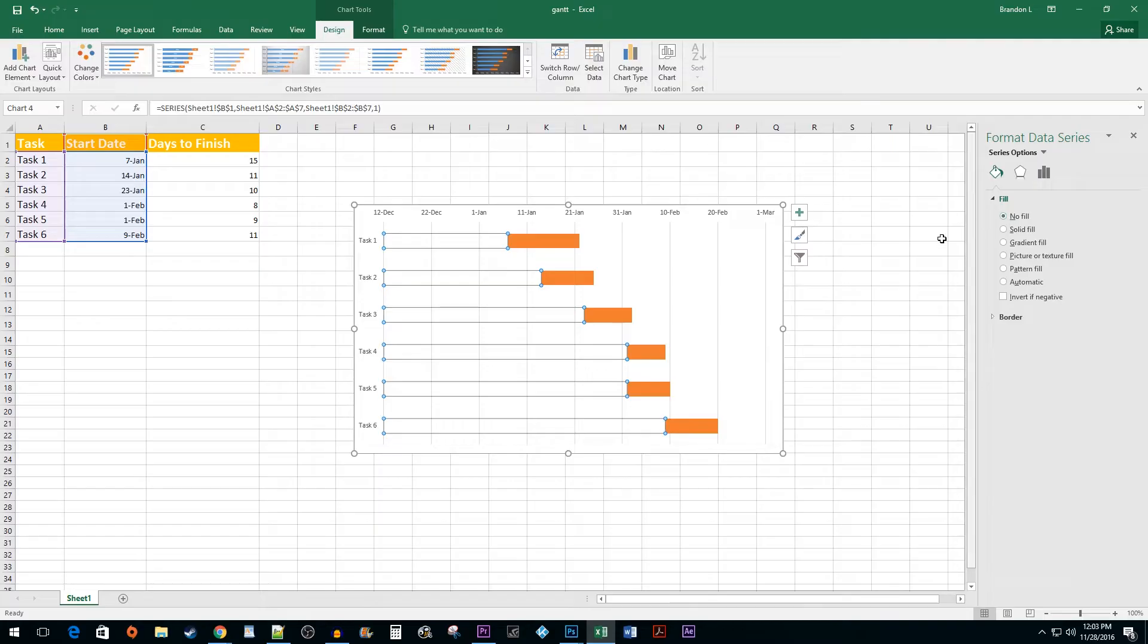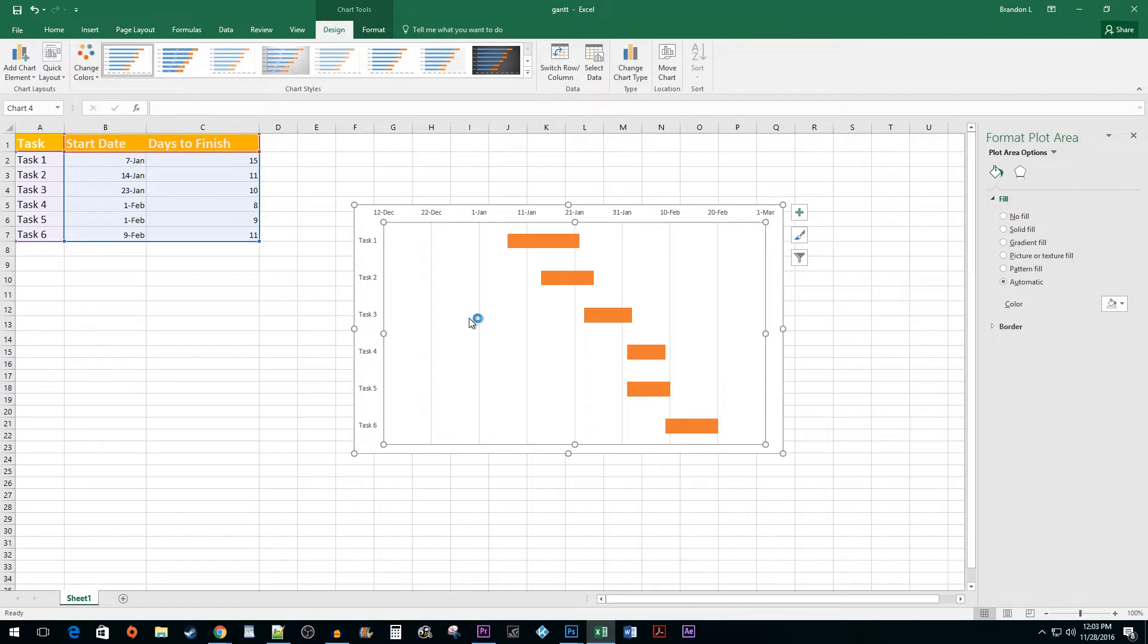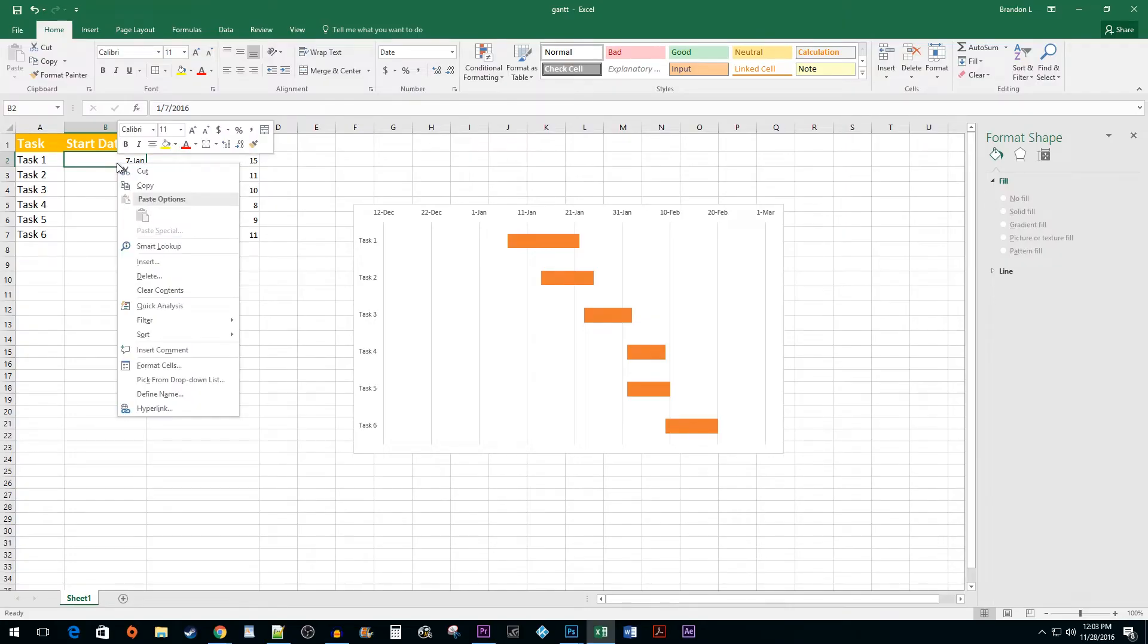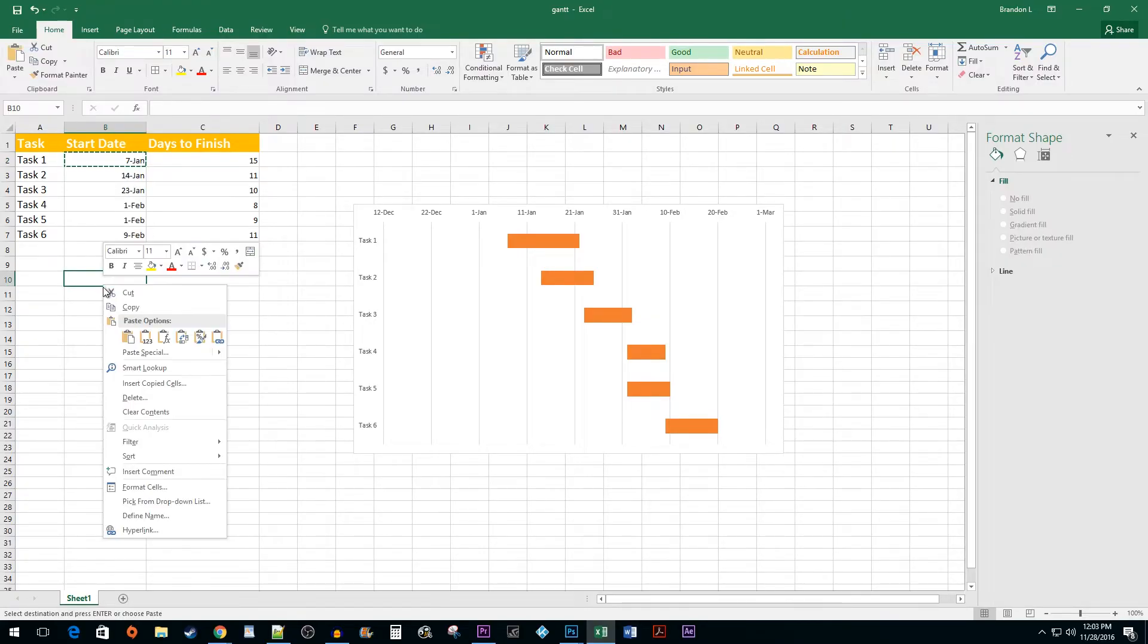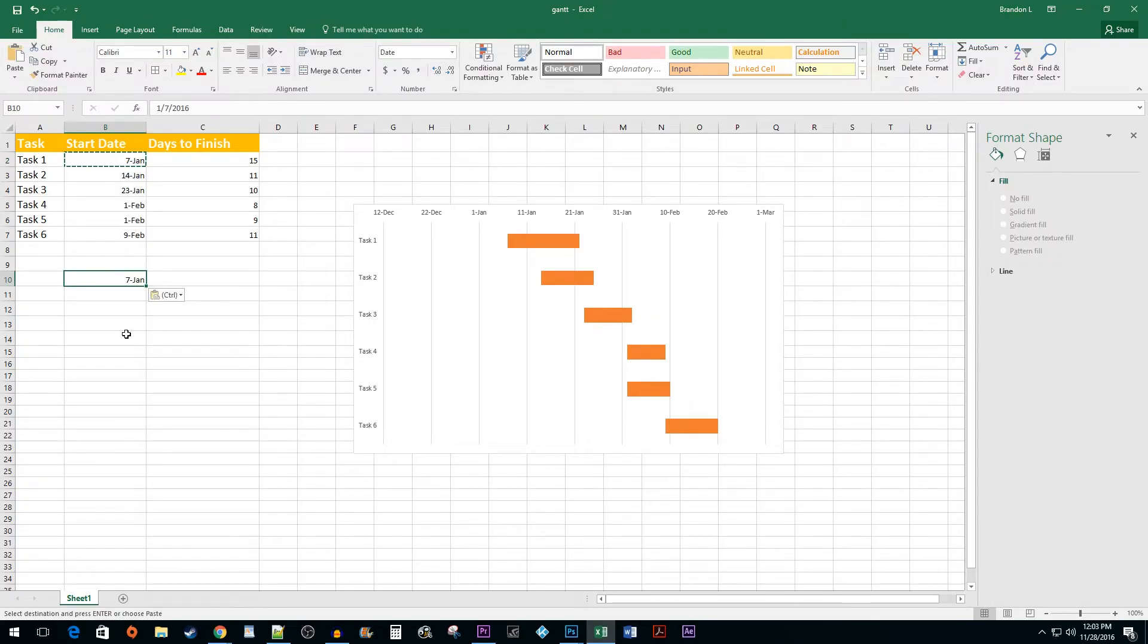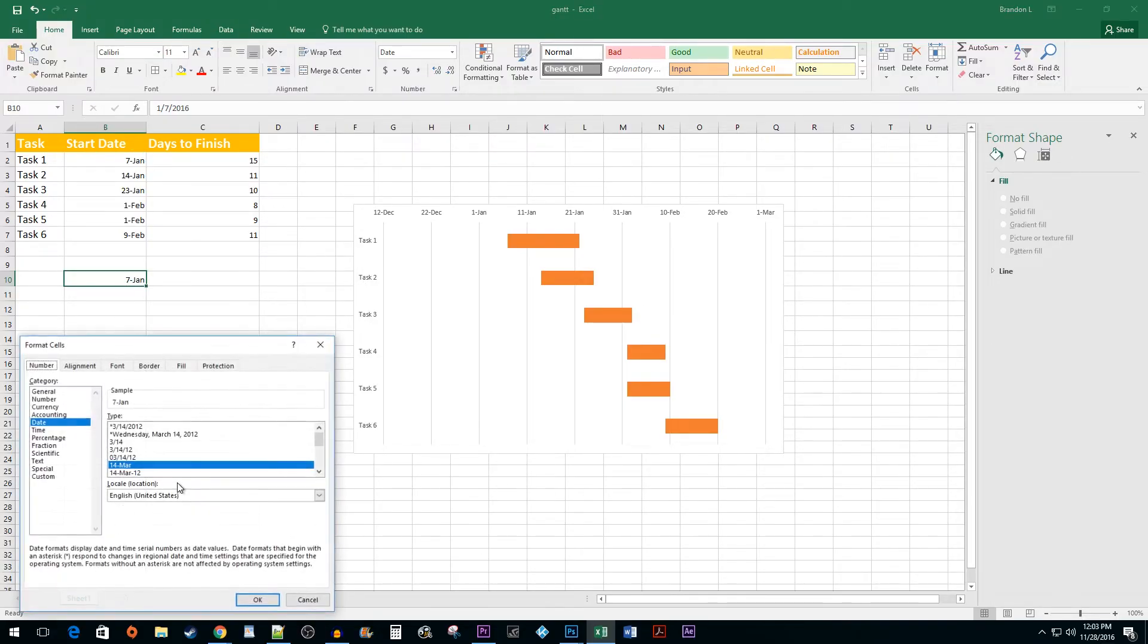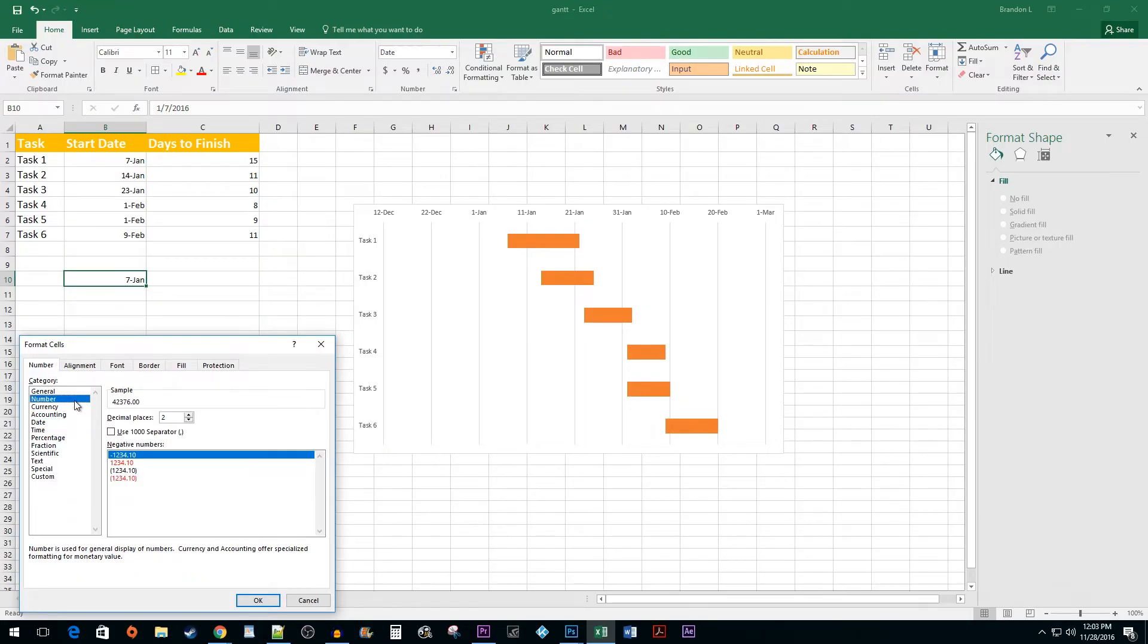Alright, now this is looking more like a Gantt chart but there is still all this extra date space that we don't really need anymore. To get rid of this, start by selecting your first start date. Copy it and then paste it below. Right-click on the pasted value and select Format Cells. Click on the Number Category and hit OK.